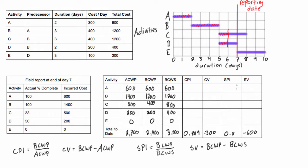We also were able to find out based on our schedule performance index, because this is less than 1 and your schedule variance is negative, both of these tell us exactly the same thing - that our project was behind schedule. So that was the summary from the last video.